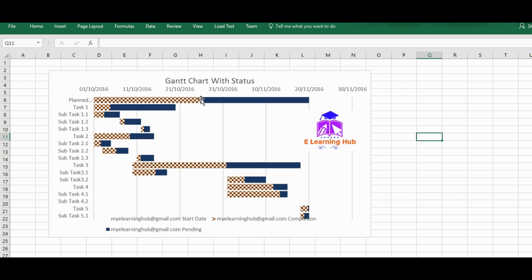If you can see, this particular activity has been completed 50%, so it's been shaded in different colors. Earlier we have just drawn a Gantt chart with the activities and the starting date and durations, but in this we'll be incorporating some extra thing, that's the status of all those activities that's there in the Gantt chart.